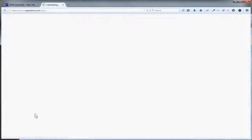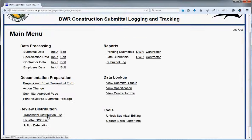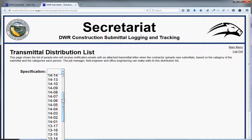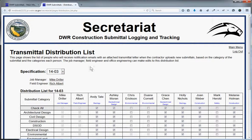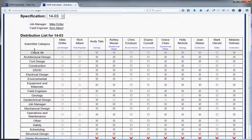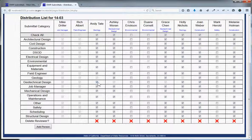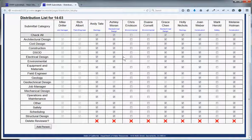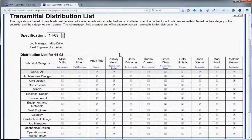The distribution list identifies which people on a particular job are notified by email every time a new submittal comes in, based on the submittal's category. For example, Rich and Andy are set to all categories, so they get notified for every incoming submittal. But Dwayne is only checked for environmental, so he only gets notified when environmental-related submittals come in. Job manager and field engineer are always in the first two columns because they are fixed — they must receive everything. This is all custom coding based on what my supervisor specified.